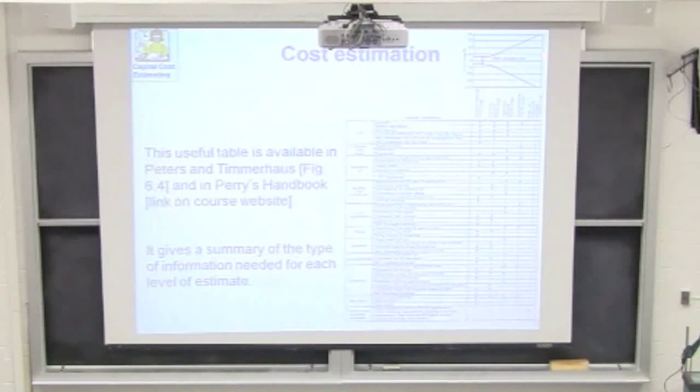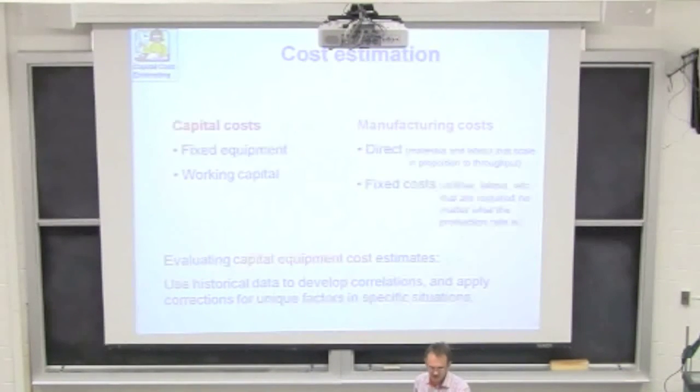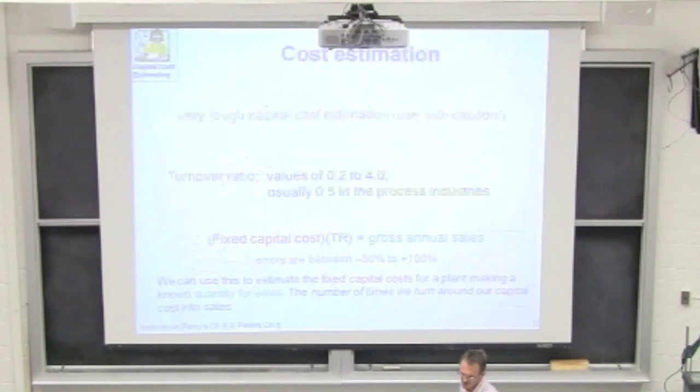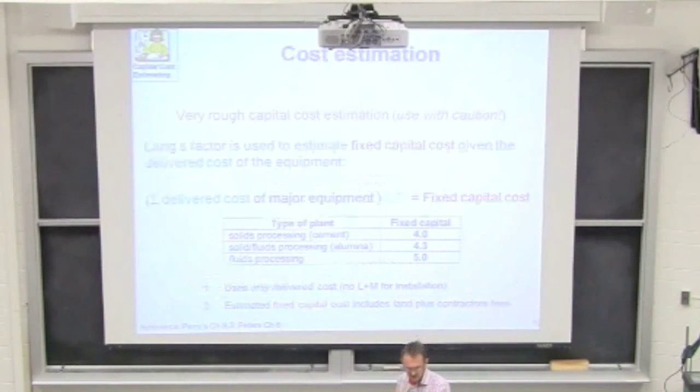But here's what I mainly want you to get: this diagram works the opposite way around. It works from right to left. At this stage, it's showing you your error. There's error of zero. At this early phase, you've got errors that are very, very large. And as you get to more and more detailed phases of the project, that funnel comes in and your error estimates are much smaller. Okay, so Tyler's going to be talking about the stuff here on the left-hand side, on the right-hand side tomorrow, on Friday. What I want to do is have you think about some things here.